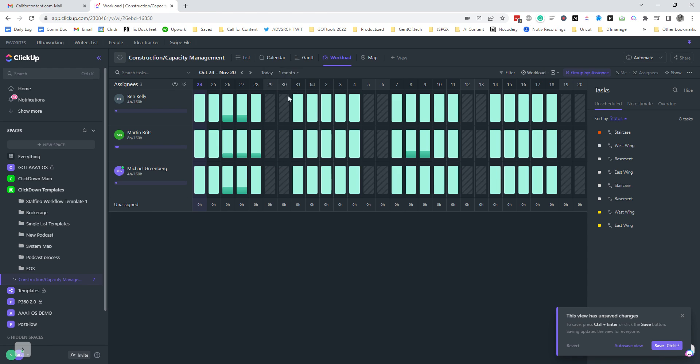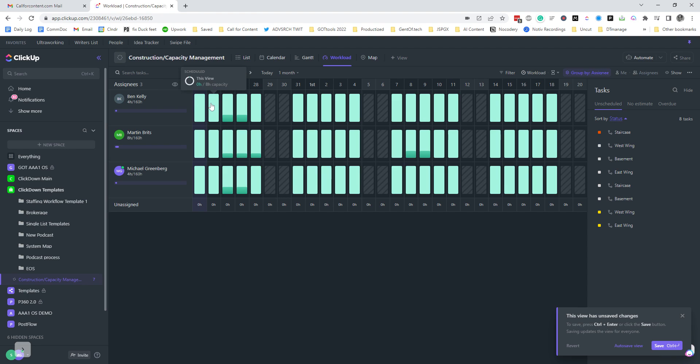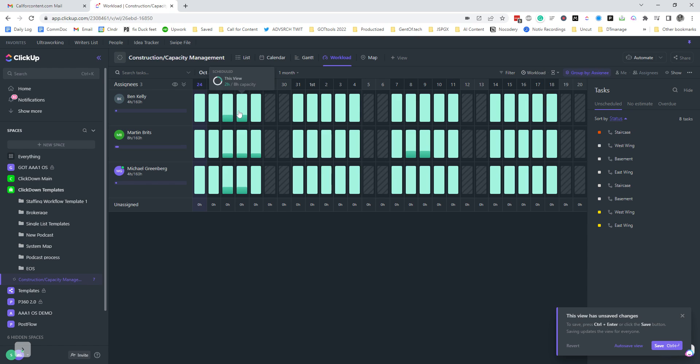Somebody who's probably got to be there all the time. So then if we look in here, you can see no capacity on weekends. We've got how much of their time is being spent each day. So this is a two-day project, this is a small project. They've got two days on it and it's going to take two hours each day. You could definitely schedule that as one day, and let's try that.